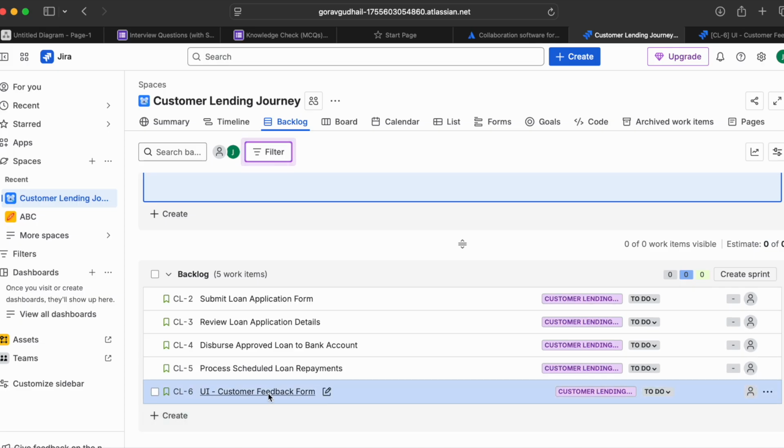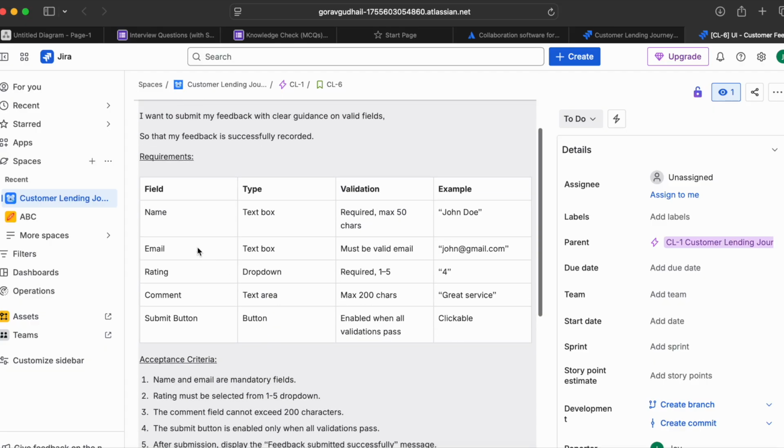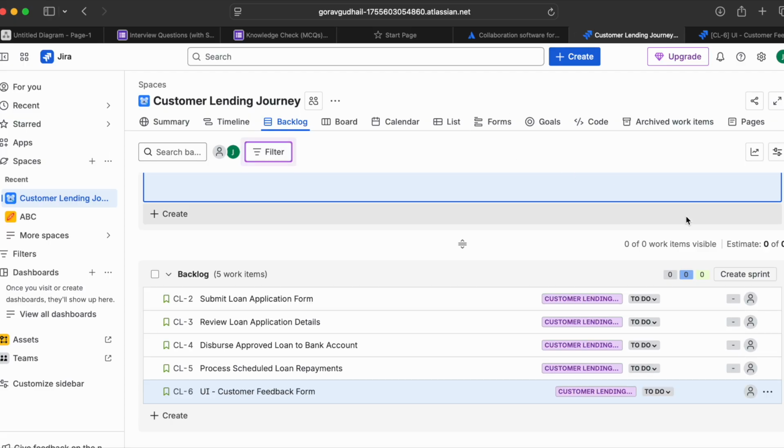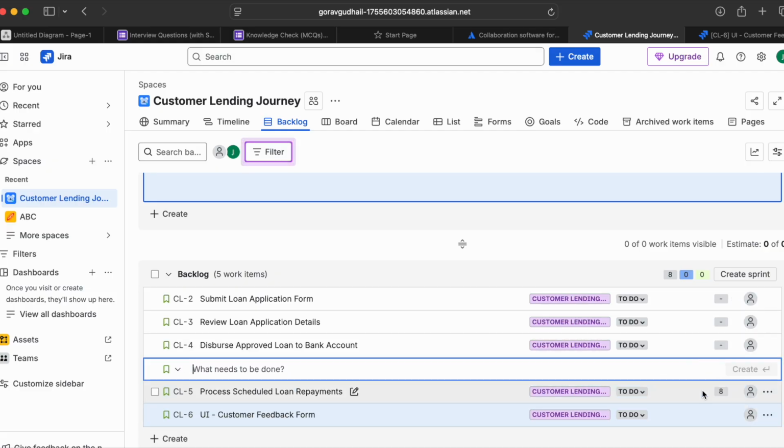Okay, so this is the front end. How many fields do we have here? We have 1, 2, 3, 4, 5. So 5 fields, with these 5 fields and validation, I would recommend a medium or large size user story, with testing, and I'll go with it. Okay, so here I'm scoring this user story, but something is wrong in Jira. It's not showing the estimation box here, so I'm just putting it here. Okay. All right. So that's the end of our student exercise.